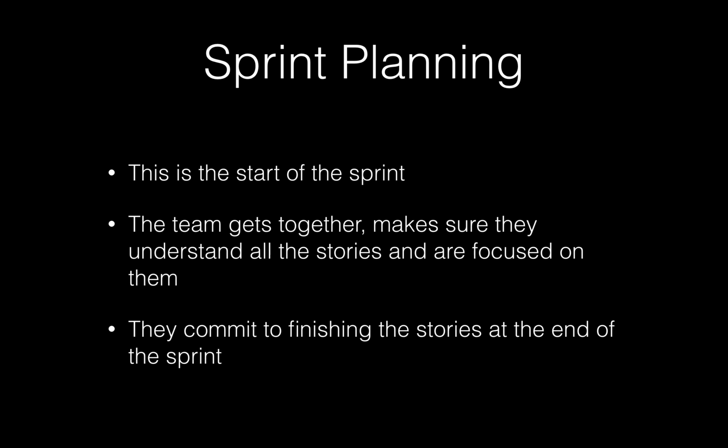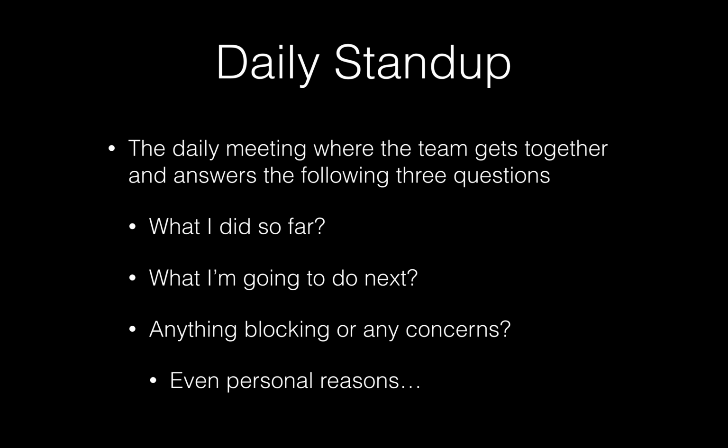That's sprint planning. Next, daily stand-up. It's a daily meeting. It's generally supposed to be about 15 to 20 minutes, nothing more than that, where the team comes together. They answer 3 questions. What did I do so far? So basically, what did I do yesterday? What am I going to do today? And if there are any concerns or any blockers that I have.